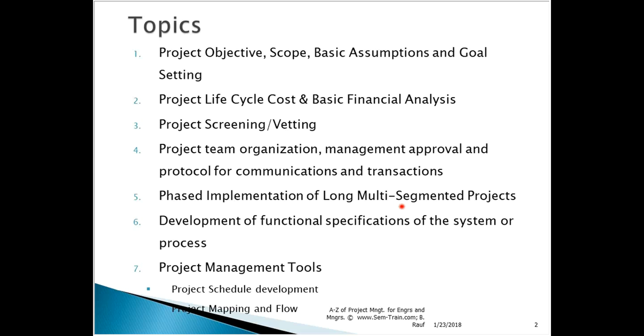When the contractors got on site, they were going to stay there for all 3 segments, but because each $2 billion reactor segment would span over a year and a half or so, they broke the overall project into 3 segments and set up teams that would be there for each segment. And when certain parts of the project were taking place in parallel, you knew who would be doing what, and kept things on the critical path on schedule and so forth.